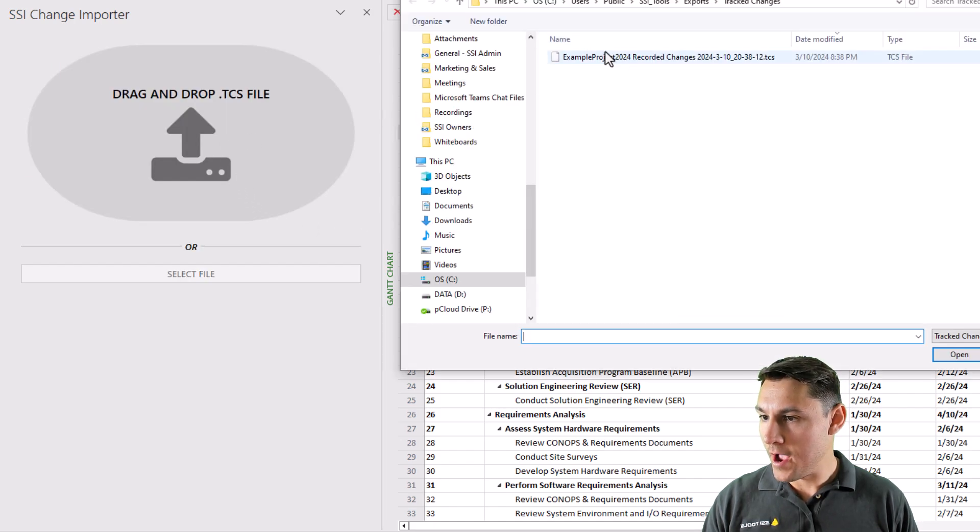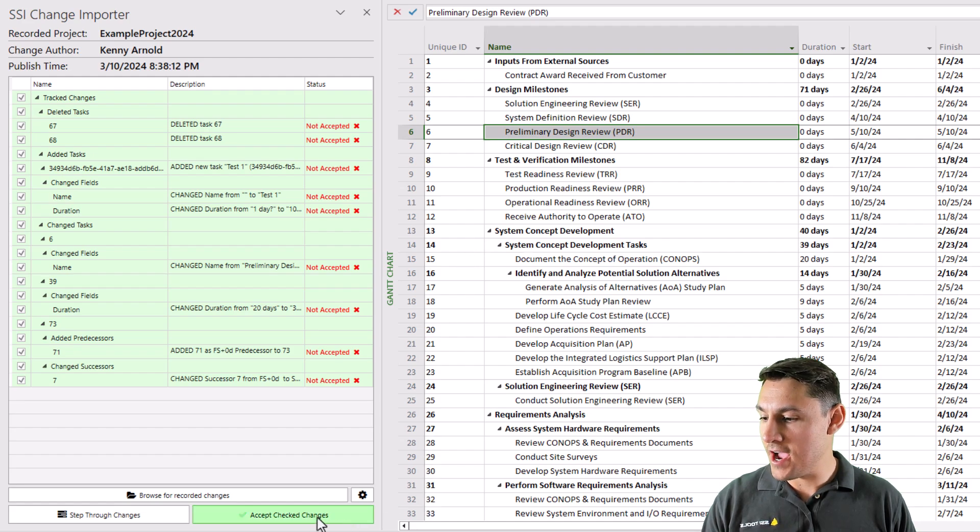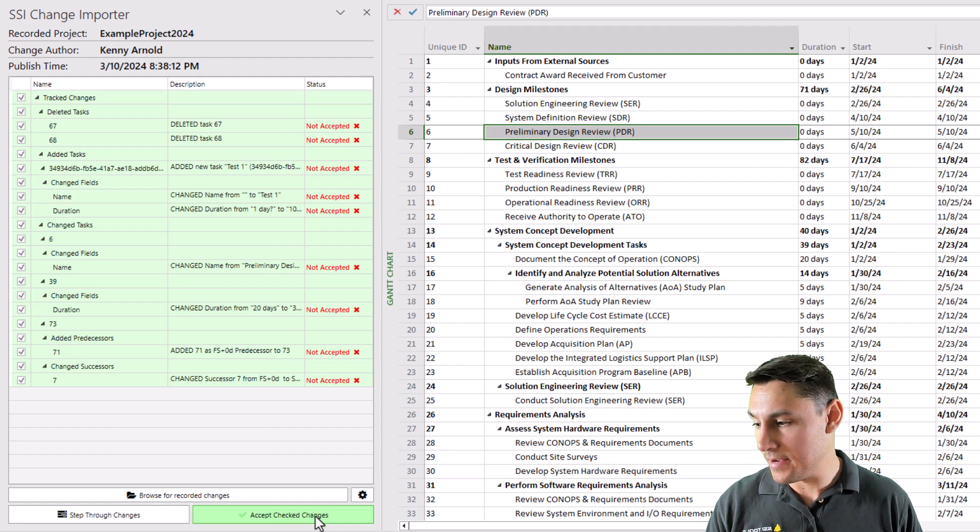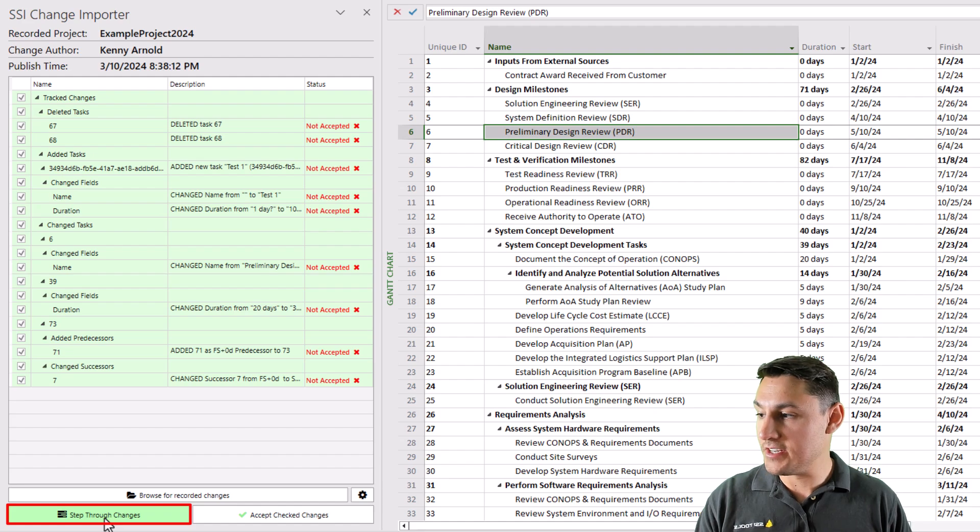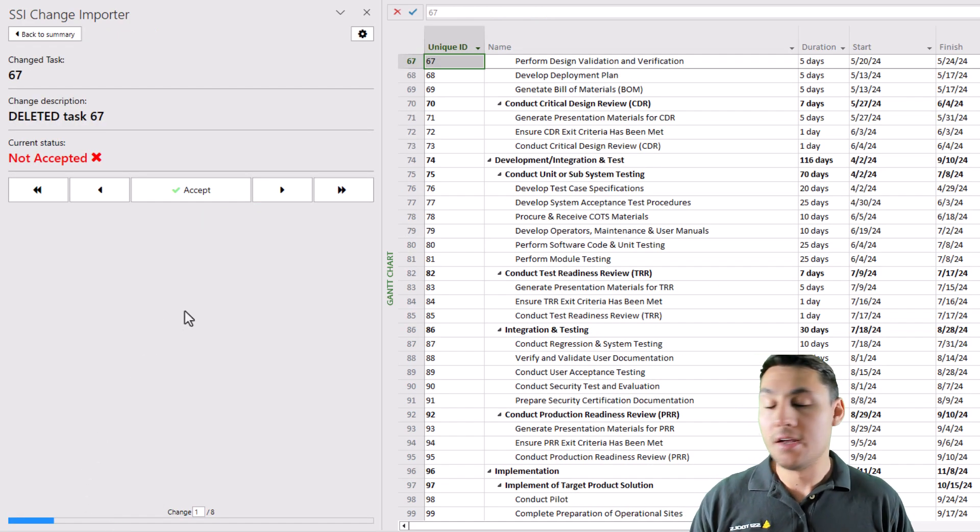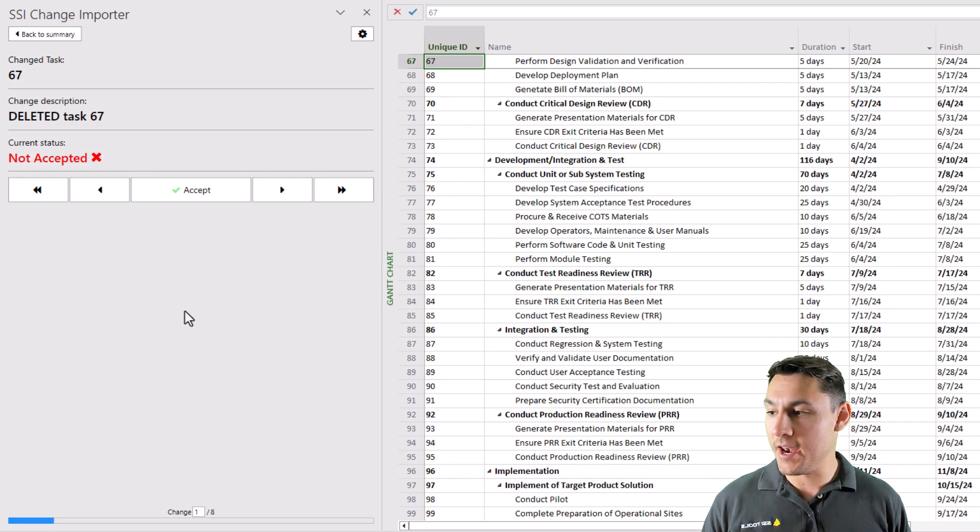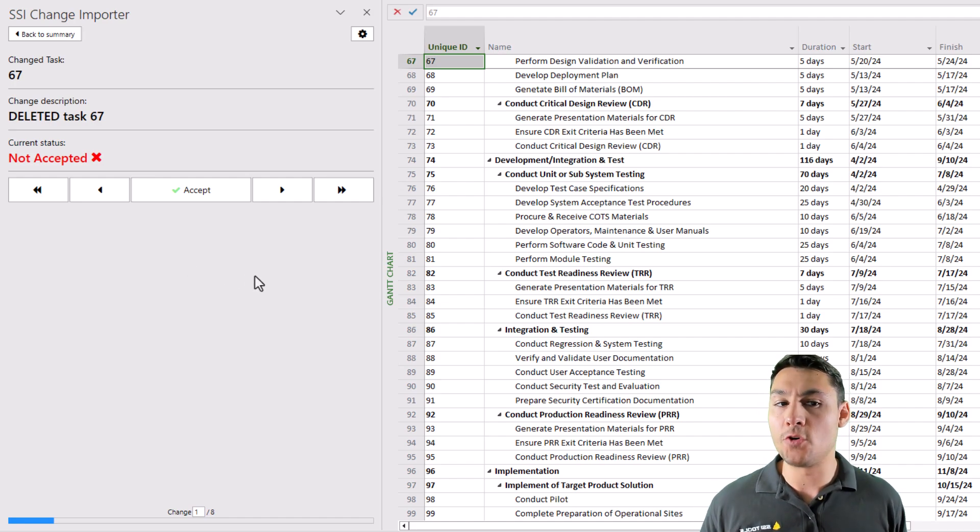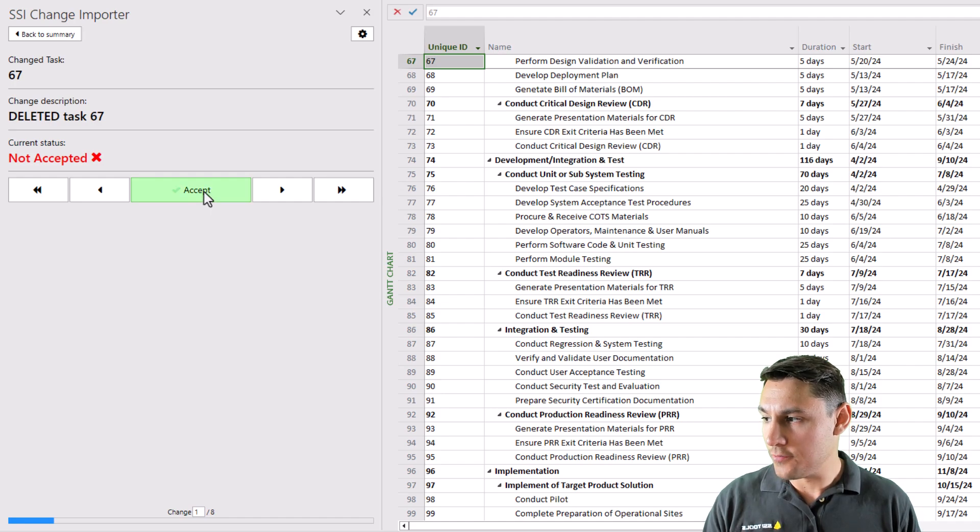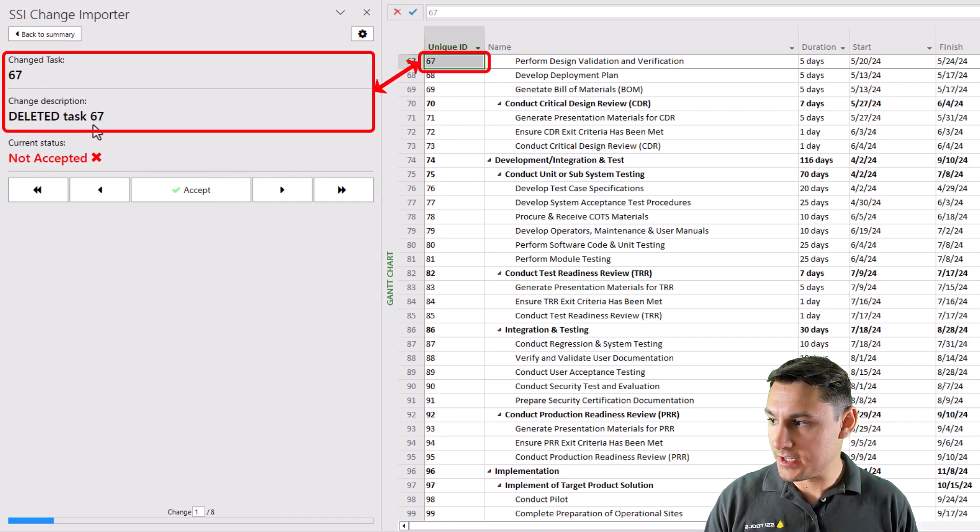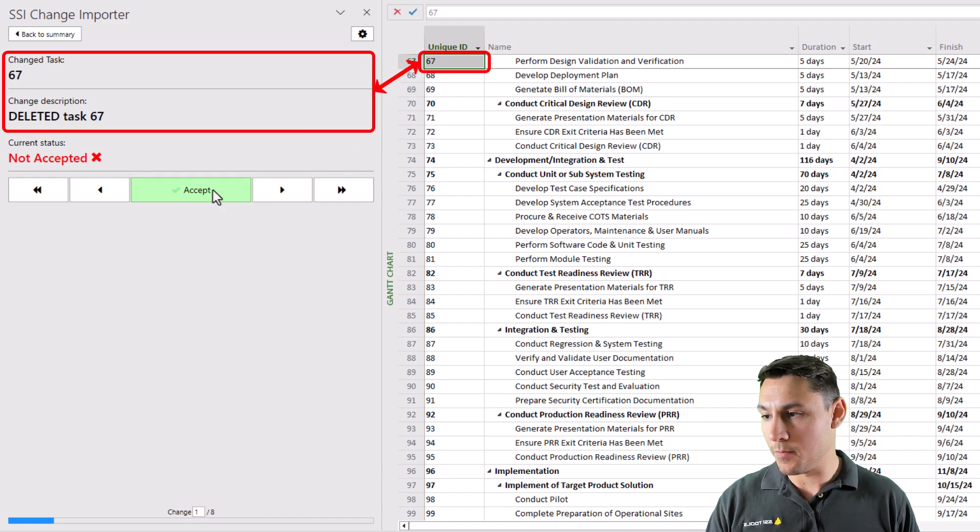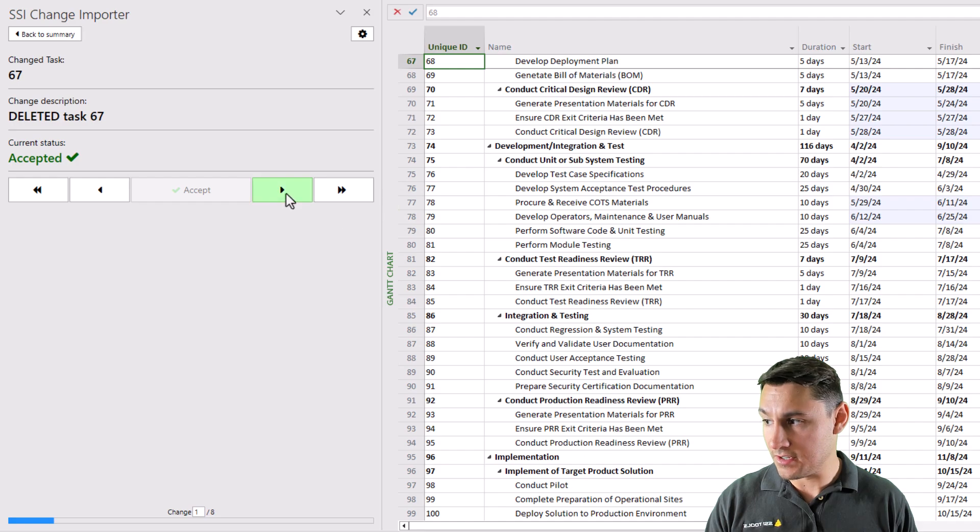Grab my tracked changes file, and this time, instead of just clicking the button to accept all the tracked changes, or all the checked changes, I should say, I'm going to click the button that says Step Through Changes. Now, what I'm going to be able to do is walk through these changes one at a time and either accept or reject them. So if I click the Accept button here, what's going to happen is task unique ID 67 is going to be deleted from the project. I'll accept, and you'll see that that task is gone.